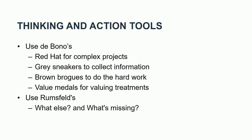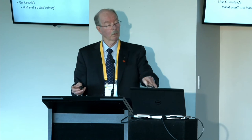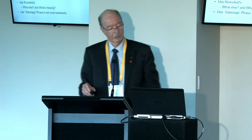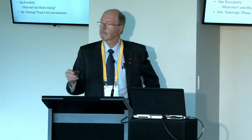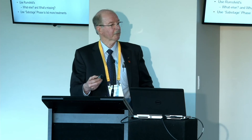The sabotage phase is what I use with mature workshop groups to brainstorm how they can cause a project to fail. We then use problem reversal to get good treatment solutions. People can develop many more ways to cause a project to fail, and so you can get some good treatments from there. I'm also very much a fan of scale models, testing functions with simple tests, engaging hands-on experienced people to train, intensifying quality assurance, and pre-emptive mitigation plans.